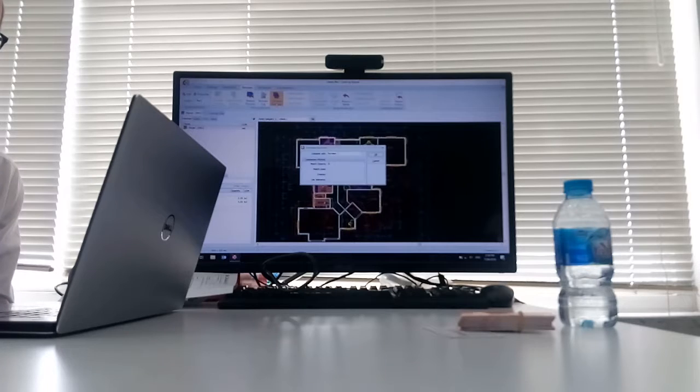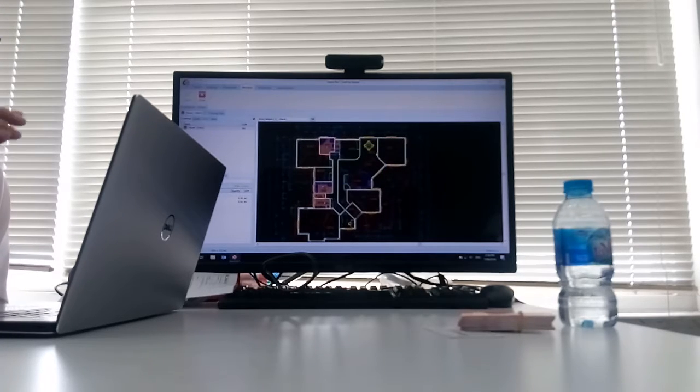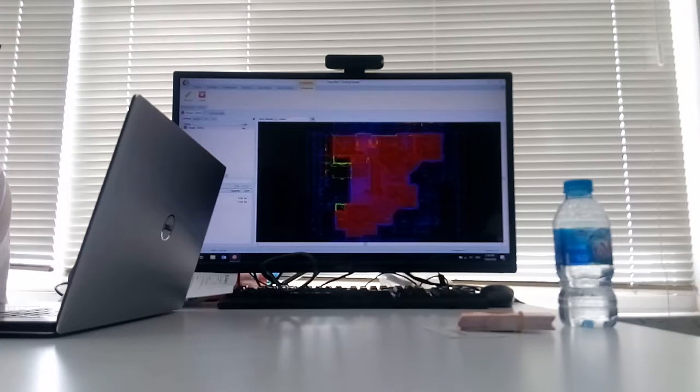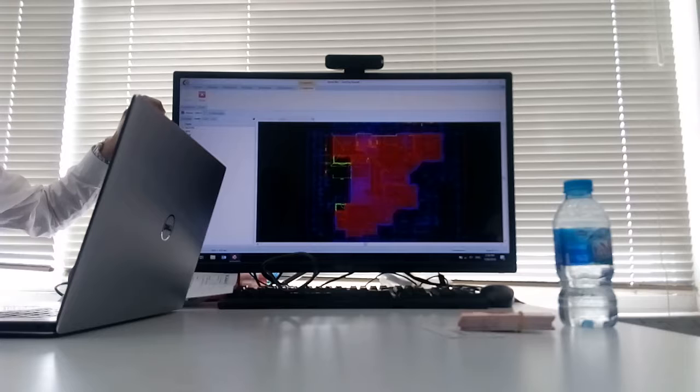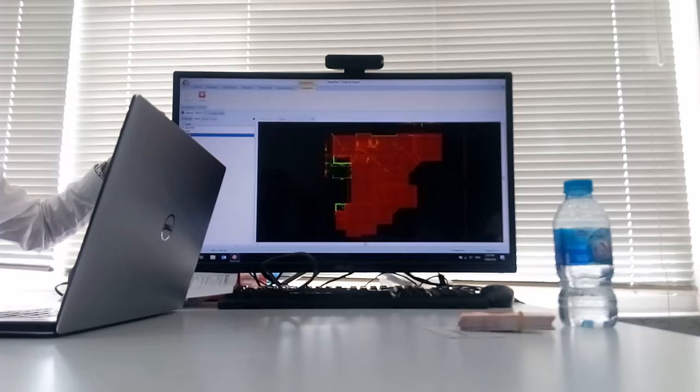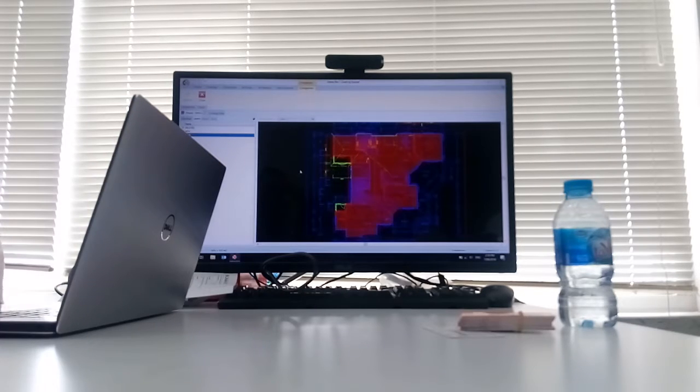There is a compare drawing function for a first round of checking. It overlaps both drawings together and shows you the difference. We give you these layers: line deleted from initial, new line compared to initial, and same line compared to the initial drawing. From here we notice there is a change in a very small area.